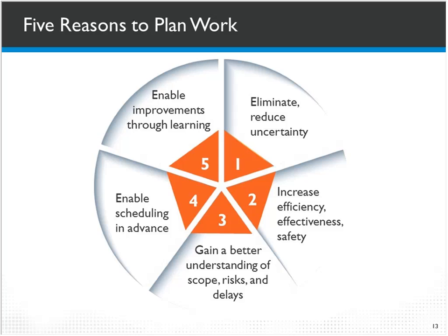That's number 3. Number 4 on our little chart here says you have to plan the job out first and get an estimate of the number of man hours it takes to do the job before you can ever put a schedule together. Your schedule would be completely non-workable and non-achievable because there's no man hours. So you just wouldn't be able to do it.